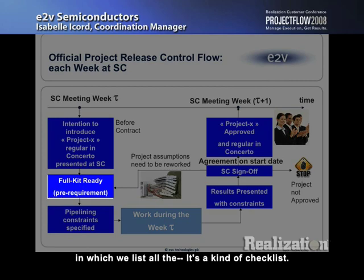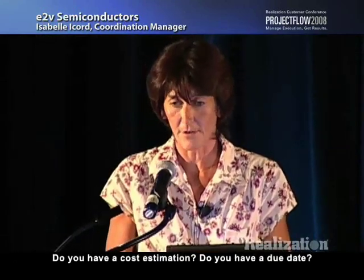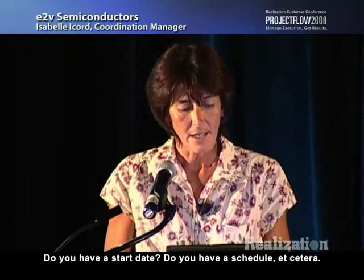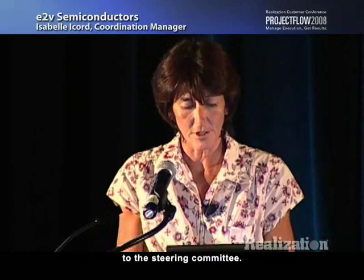So we developed a dedicated document for the full kit, in which we list all the items. It's a kind of checklist. Do you have a risk analysis? Do you have a team? Do you have a budget? Do you have a cost estimation? Do you have a due date? Do you have a start date? Do you have a schedule, etc.? So we present all that for the project candidate to the steering committee.